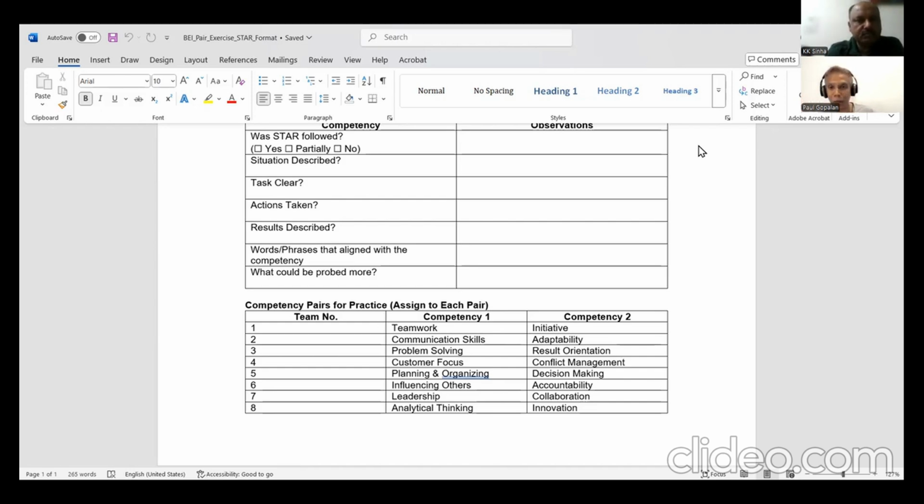So what I did as a team leader at that time was to get all the deliverables out and go through the checklist one by one with all of my project managers and get them to state what they were doing or what they needed to get done in order to meet the requirements of the client. So the first thing was that we stayed under budget by having a checklist and going over the deliverables. And after our deliverables, to talk to the client and be very, very clear as to what we can do within the prescribed budget.